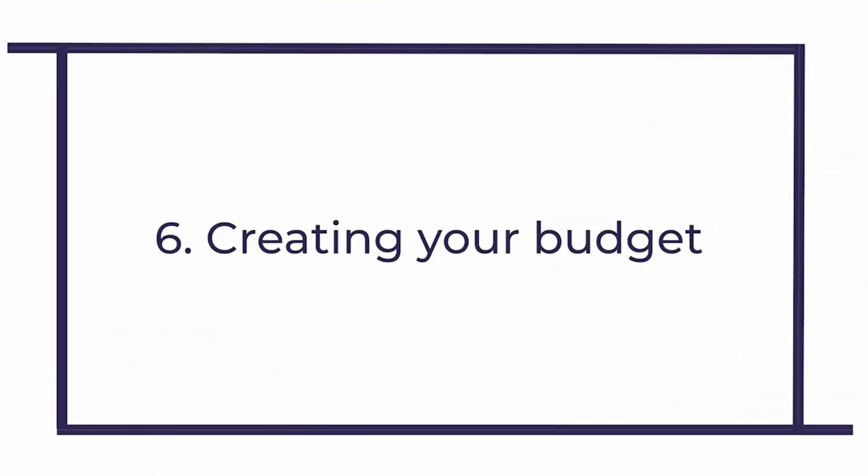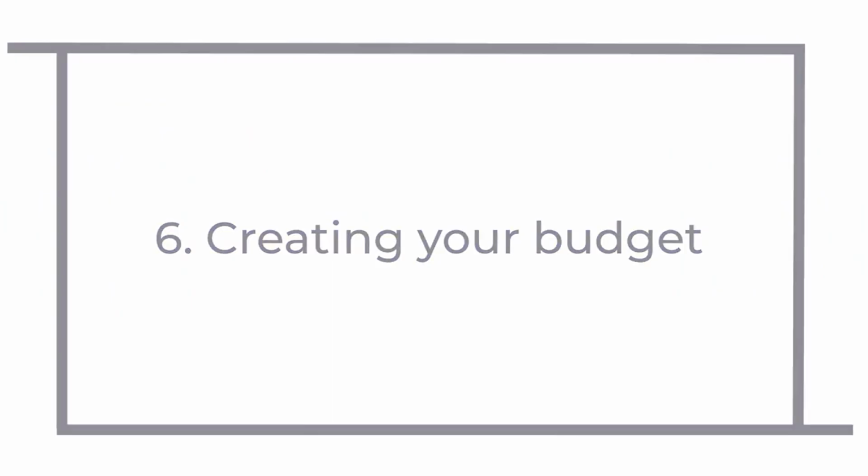Now, tying into this is step number 6, and that's creating your budget. So again, you want to review the quotes you've received and also compare numbers with the previous year. You also want to outline budgets for different levels. So again, it's must-haves, things you'd like to have, and other additional options, and determine what level of budget you need for each one of those. And so as I mentioned, this can tie into potential fundraising you need to do. A key mistake people often make is thinking that ticket sales alone will cover the entire cost of your homecoming dance, and usually that's not the case.